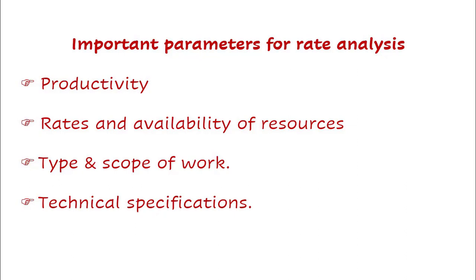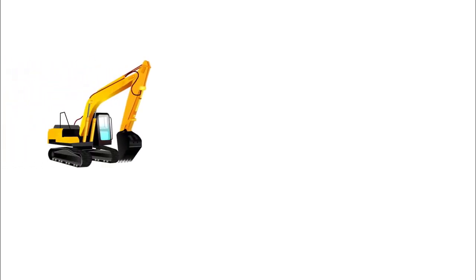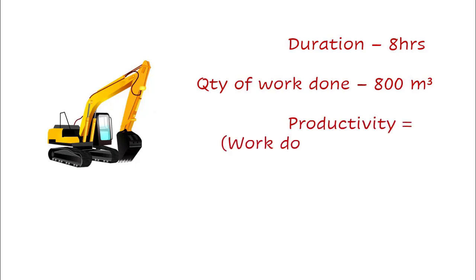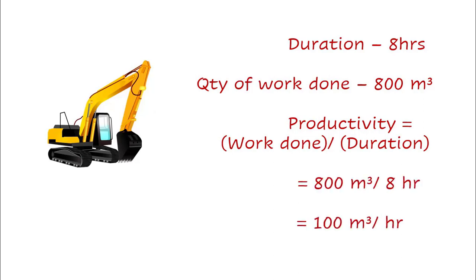The first parameter is productivity — the rate of output per unit of labor or equipment engaged for a particular work. For example, consider an excavator that excavates 800 cubic meters in 8 hours a day. Then productivity equals work done divided by duration: 800 divided by 8 equals 100 cubic meters per hour.